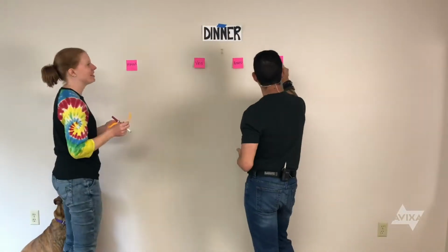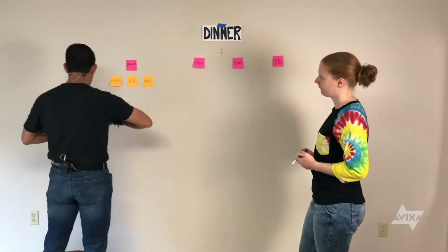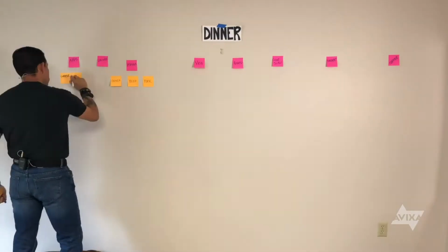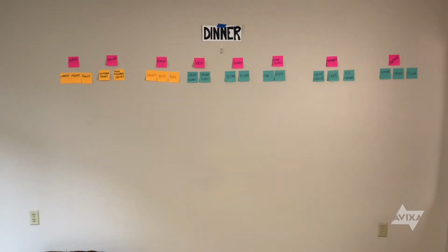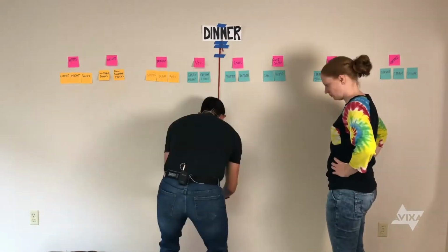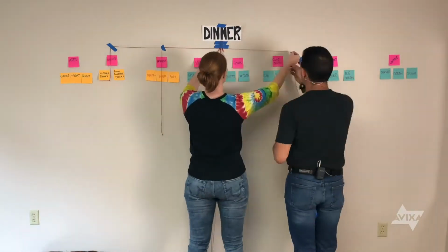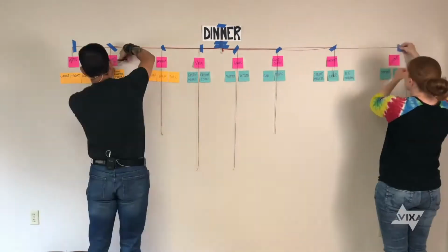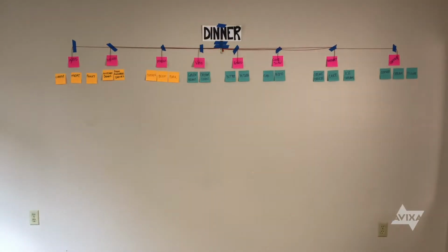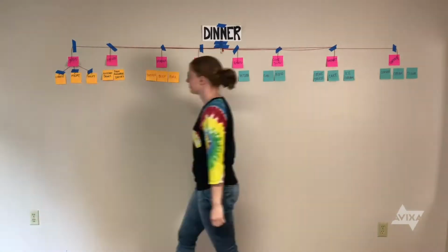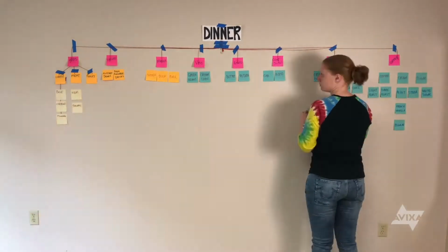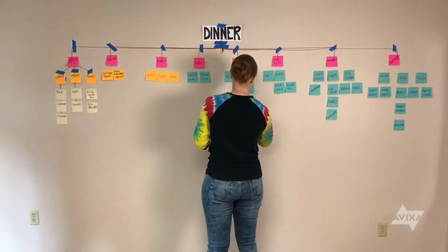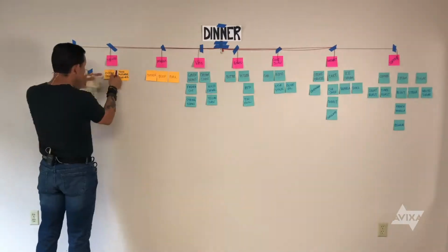As I break the tasks down, I want to discuss these tasks with the project team to ensure I have all the tasks needed. Then, I want to break each larger task down to its smaller components. And then, I want to break those smaller components down even further. Once I have the task broken down to its smallest component or smallest task, I start on another large task.